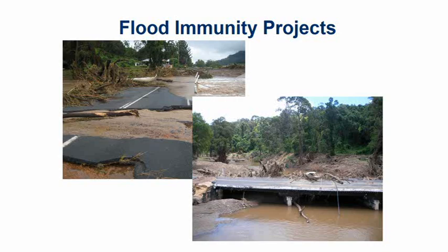So you could have as a program, it's quite interesting because you may have diversion routes for some of these flooded areas and some of them you don't. So it comes down to, again, what I mentioned in the previous video, is the most benefits for the costs that you actually have. So you'd often focus on the worst closures, not necessarily the ones that cost the least, because you want to reduce those closure times to keep the roads open as long as possible. Also got to bear in mind as well, there's also diversion routes. So you may be able to fix up part of the Bruce Highway that allows access to a diversion route, and potentially you could have quite a lot of benefits out of that as well.